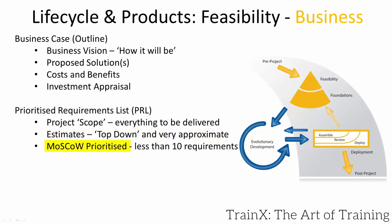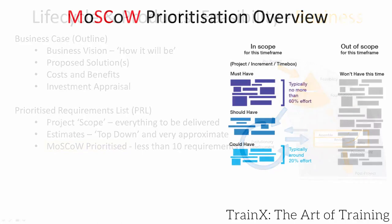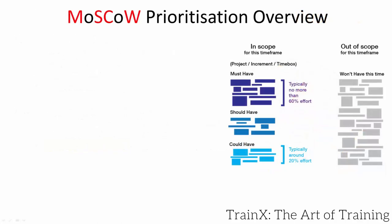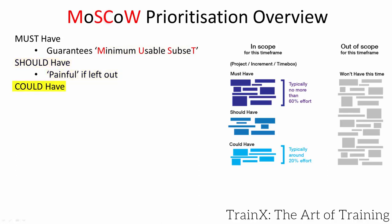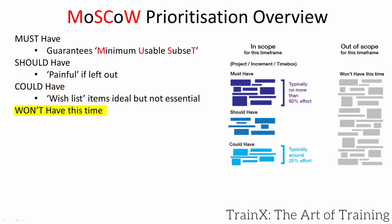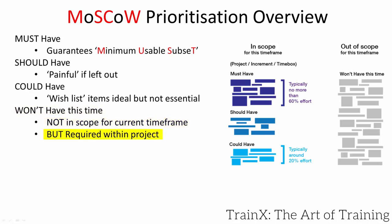MoSCoW prioritisation is utilised throughout the agile world. M denotes must — anything prioritised as a must that isn't present invalidates the value of the solution; a car must be drivable, as an example. If all the musts are met, the result will have value and is called the minimum usable subset. S stands for should — shoulds that are missing mean there is some pain in using the product. Could indicates a best-case nicety. Won't have for now can exclude an idea that isn't required but keeps reoccurring during meetings.